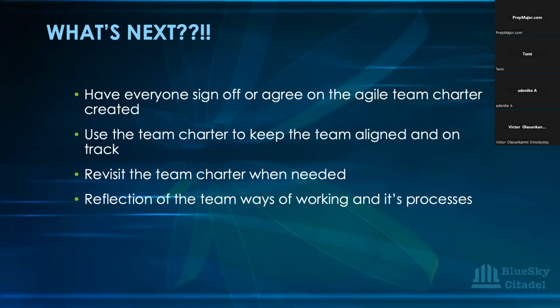Then I realized that they usually come for daily stand-up on Mondays, Tuesdays, and Fridays, but on Wednesdays and Thursdays, the first few weeks, they kept to it, they kept updating the document, and I would go and look at it. Okay, this person has an impediment, or this is what he's going to do to solve his impediment, or he needs to ask this person. So I was able to keep track on Wednesdays and Thursdays when we didn't have the meetings. But then I realized that they stopped after about 1 month. They stopped going to that document, but they still came Mondays, Tuesdays, and Fridays for the dailies, they just stopped updating the shared document on Wednesdays and Thursdays, which was a problem. But we agreed on this. I just had to remind them that this is what we agreed on. And do you want us to change it? Do you want us to eliminate the daily loop, and just have daily stand-up Mondays to Fridays, since it's easier for you to quickly jump on a call rather than typing? And they said, okay, yeah, we can do this.